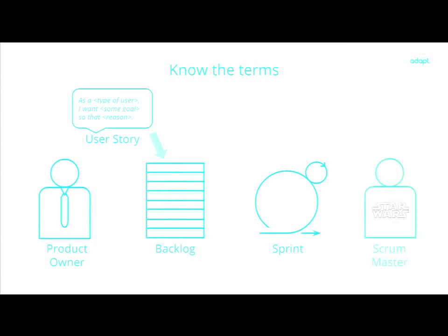On the other end, we have the Scrum Master. The Scrum Master is typically a guy from the team, might be a technical guy, and his responsibility is the sprint. So he and the team, working with the product owner, find out what can we say that we will do for the next 2 weeks. And then we say, okay, this is our task, we need to do this as a team. So the Scrum Master owns the sprint, and the product owner owns the backlog.